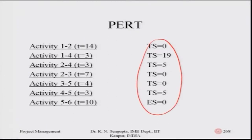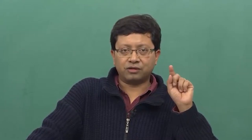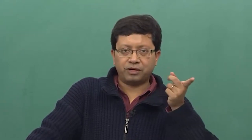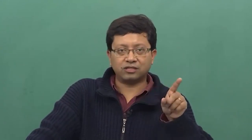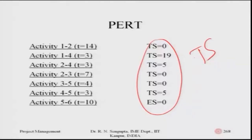Using those formulas: activity one-two has total slack zero, one-four has total slack zero, two-four has total slack five, two-three has total slack zero, three-five has total slack zero, four-five has total slack five, and activity five-six has total slack zero. I strongly urge students to work through these calculations themselves using the forward and backward pass values.